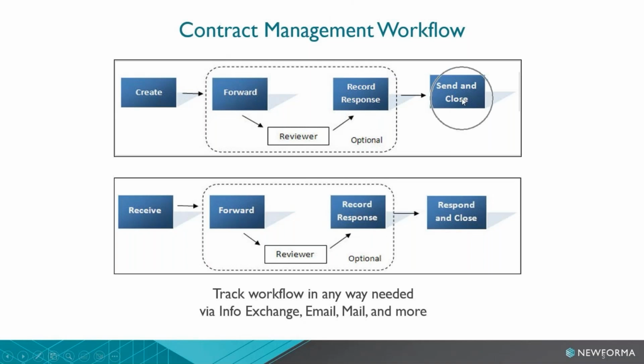But at the end, when we close it, we're either sending it and closing it, right? So if I'm a contractor, I'm going to send it back to the subcontractor and close it out, saying here's that submittal, etc. However, if I'm receiving that from somebody else, I need to send them my response and close it out. So that's where that difference is in the workflow, and it makes a little bit of a difference in what that form and the information looks like when we're closing it back.